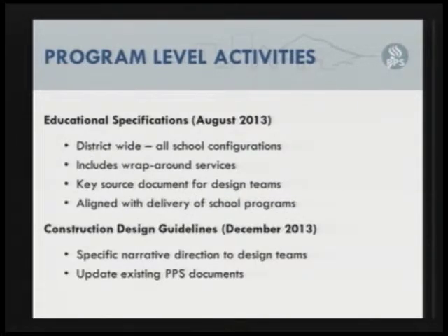Closely aligned with the educational specifications are what we term design guidelines or construction design guidelines. And these are documents that align with our ed spec that permit the district to specify its preferences relative to a number of factors in the design. Factors such as use of proprietary specification, which you as a school board get involved in if we make a recommendation to provide proprietary items. Also, we provide criteria on the type of roof systems, what type of warranties we're looking for, really delineate what's important to the district, and then apply that uniformly across all of our improvement work.